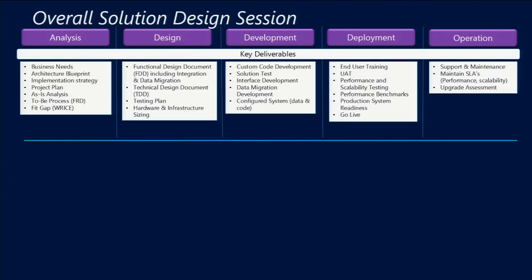So the question is, usually customers don't want to pay for all of the documentation. So the focus is on the gaps, not on the actual fits. And I think that that's actually okay from a practice perspective, because you can document the setup and configuration of the system after the fact. It's more that we're focused on the customizations themselves, as opposed to that. So that's an acceptable best practice.